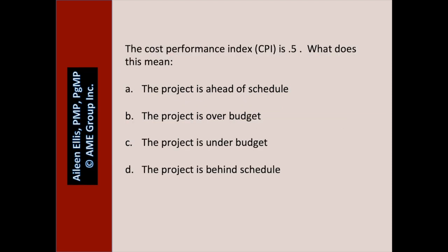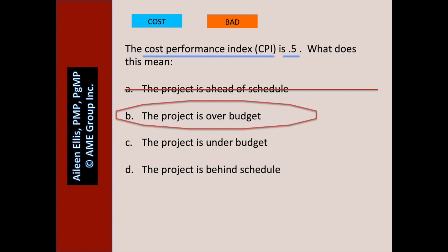The cost performance index is 0.5. What does this mean? Pause the video and answer the question. I ask first: are we talking about cost or schedule? We're talking about cost. And 0.5 — is that a good or bad number? It's a bad number. A: the project is ahead of schedule — we don't know because we don't have the schedule performance index. B: the project is over budget — B is definitely true. C: the project is under budget — definitely false. D: the project is behind schedule — we don't know because we don't have the schedule performance index.